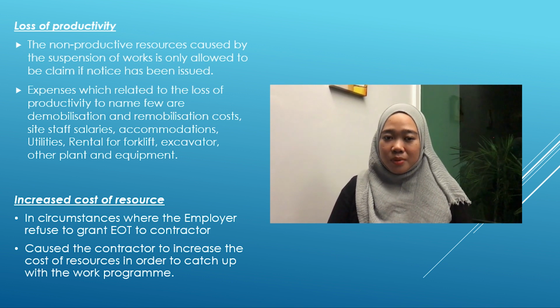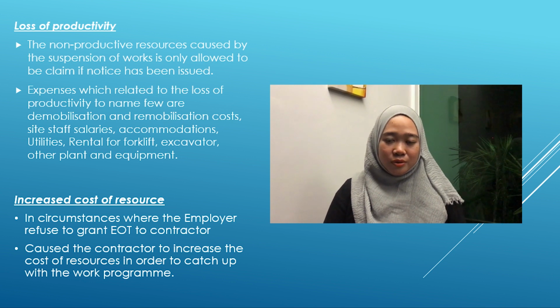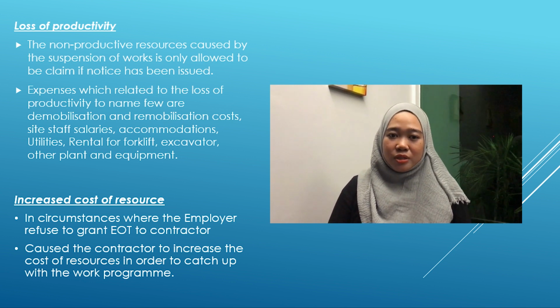The second possible head of claims is the increased cost of resources in a situation where the client refused to grant EOT. In order to catch up with the work program, additional resources need to be utilized to ensure speedy work completion.